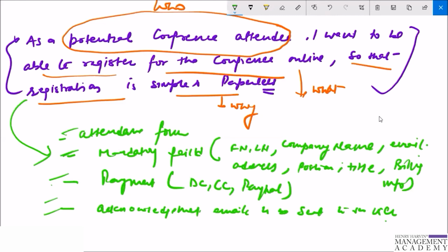But always remember that acceptance criteria should not include the code review or done, because that is a part of the definition of done. So the non-blocker or major issues, performance testing performed, acceptance and functional testing done, because that is what is intended from the user story. So the things that can be a part of the definition of done should not be covered as part of the user story acceptance.